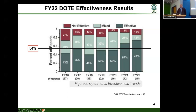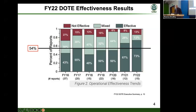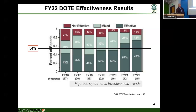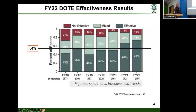The idea is we do this before full rate production — we do some low rate initial production to get production-representative items, then do operational tests and validate that the system does what we need before going to full rate production. This is the acid test of how well we do in development. The average effectiveness over about the last six or seven years is about 54 percent, which is dismal.